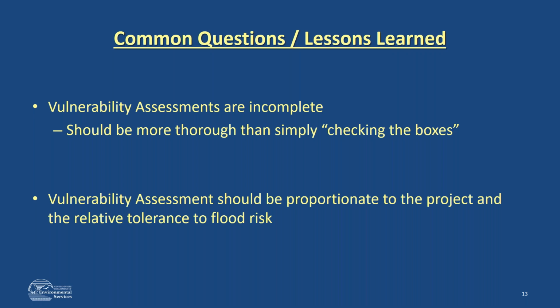Also, vulnerability assessments should be proportionate to the project. So that's what I was trying to describe, where if it's a simple project, low risk tolerance, and can really be captured in just that stepwise coastal resources worksheet, that's fine. But for a project that is more complex or more sensitive, that's going to require a more robust assessment, more thorough analysis. From your perspective as you're completing your wetlands permit application, this is something that tends to cause delays in the process, where if this information is planned out and provided up front, it just streamlines the process and makes for a smoother review and permitting process.